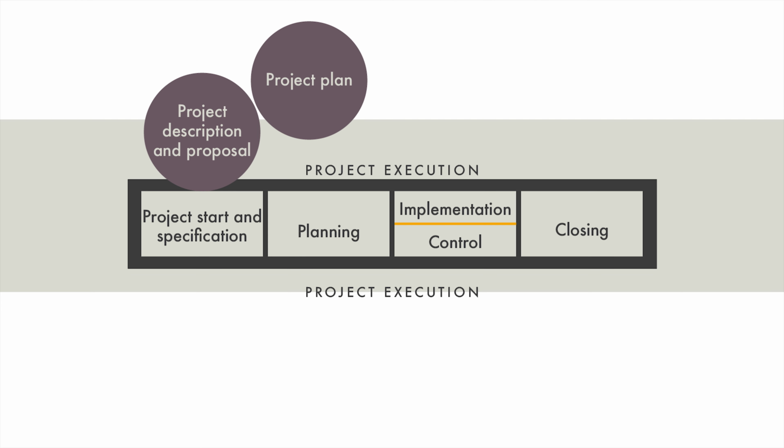If management makes a positive decision on the implementation of the project, then the next step is to draft a project plan, which is typically also a responsibility of the project manager. The project plan is a key project management tool that combines the most important outputs from all project management knowledge areas into a single integrated document. Compared to the project description, the project plan is far more detailed in terms of the scope description, schedule, risks, resource requirements, and other items.